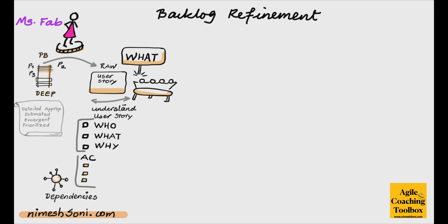As part of that, the team may also identify some additional dependencies, and if we identify those dependencies, we want to capture them, recognize them. There are some dependencies that we may have to tackle later on. Dependencies are very, very important because they contribute to the complexity of the story. They will drive how much effort is required in order to build and deliver that functionality. So definitely pay attention to the dependencies.